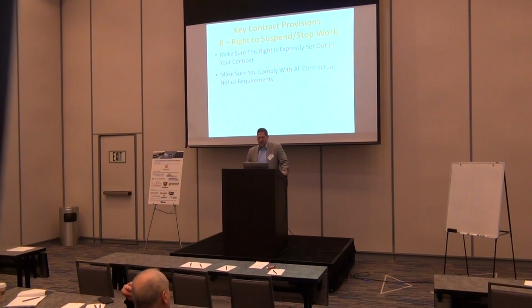So I put in something here too. Make sure that you comply with whatever is in the contract regarding notice, and make sure you walk through each step of that. Usually it's a reminder that says, hey, the contract was supposed to be paid by Tuesday, it's Wednesday, you let me know when this is. P.S. This is a demand for payment. And then if they don't respond, you say, okay, under the contract, I now have the right to suspend work. I'm going to do that on this day unless I get paid. And that way you can work through it.